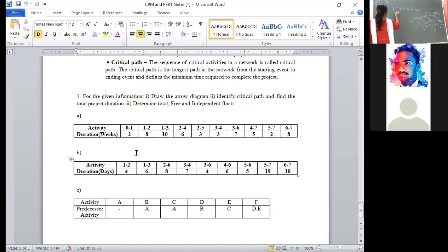This is equivalent to minimum of L6 here, 19 minus T36, the duration, that is 7, and L4 value, 22 minus T34, the duration is 3. Here we have to calculate the minimum value. Minimum of 19 minus 7, it is 12, and 22 minus 3, it is 19. The minimum is 12. Wherever L3 is there, you write down 12.